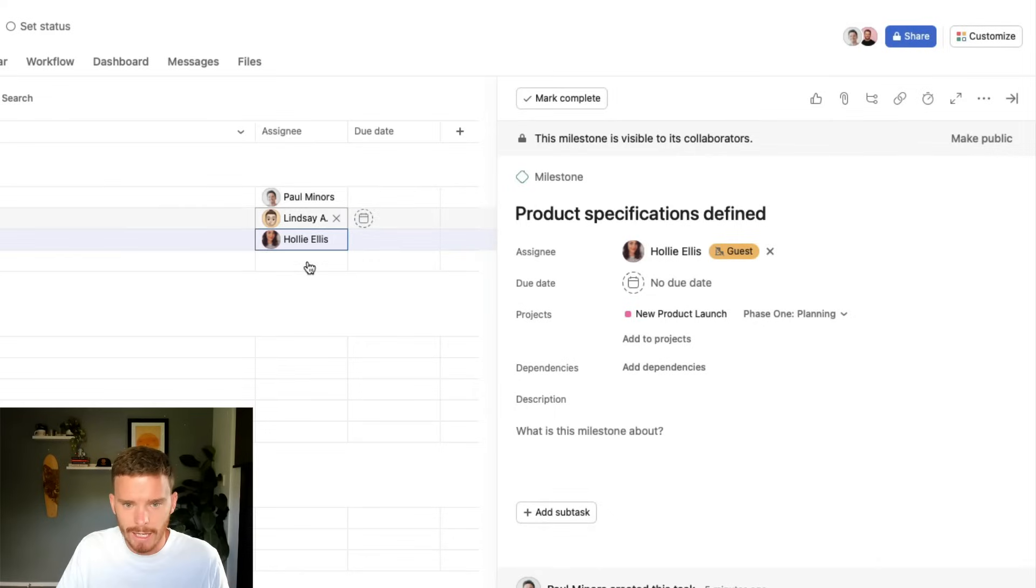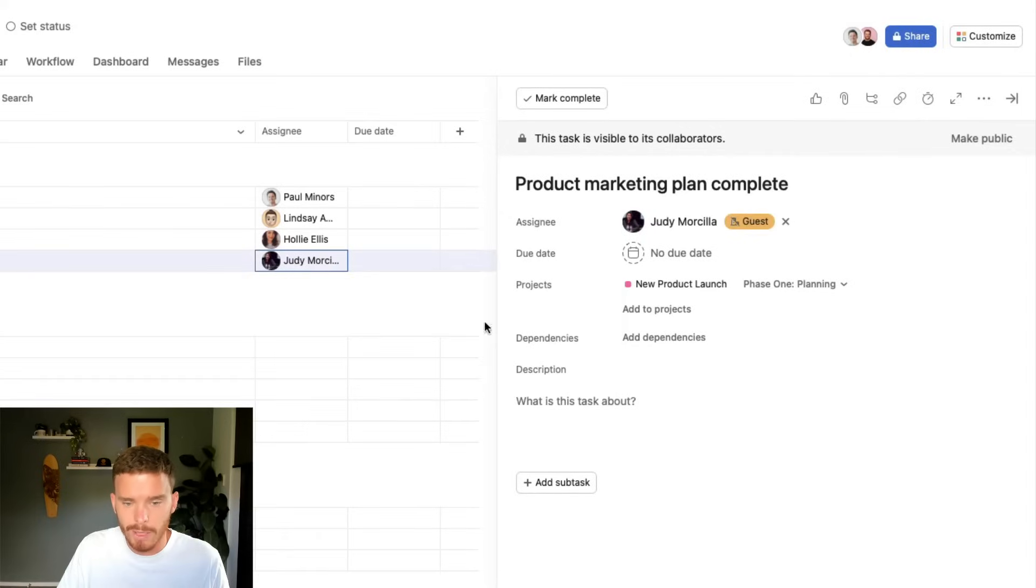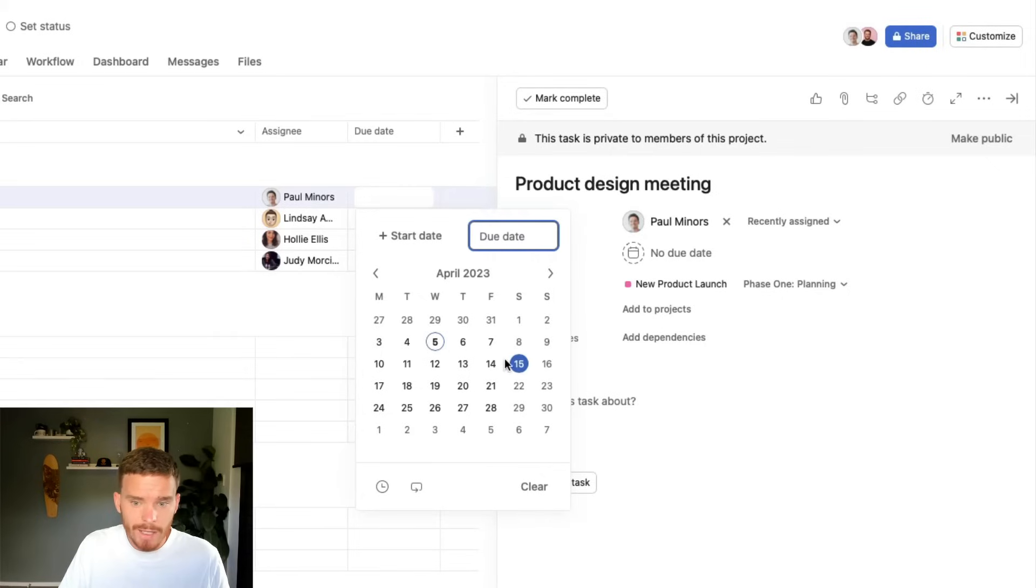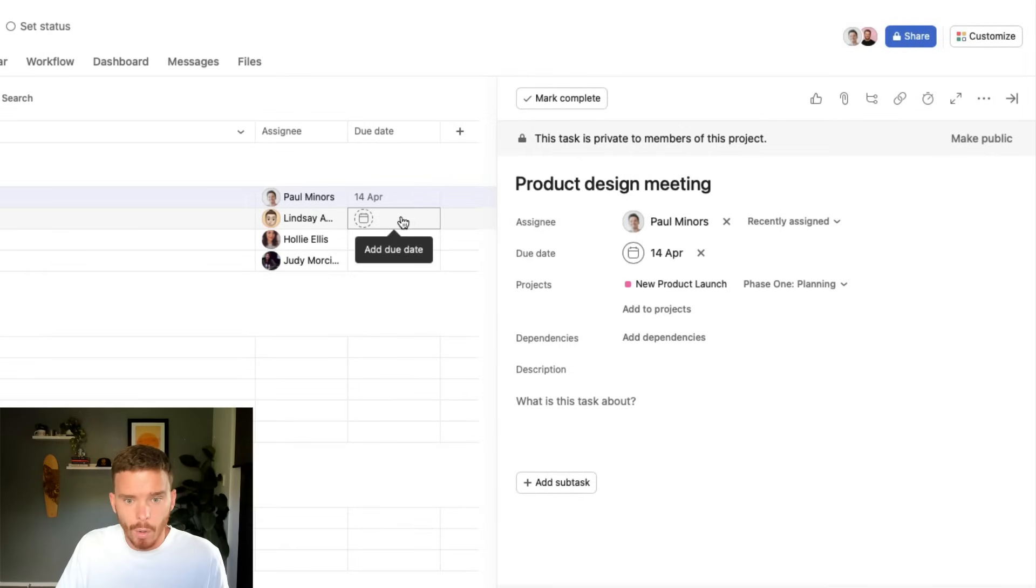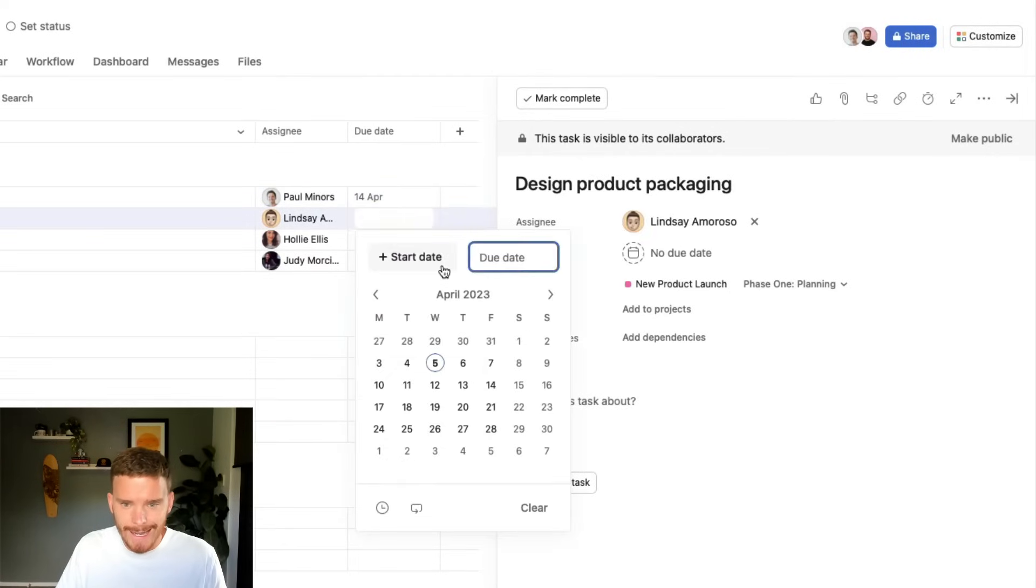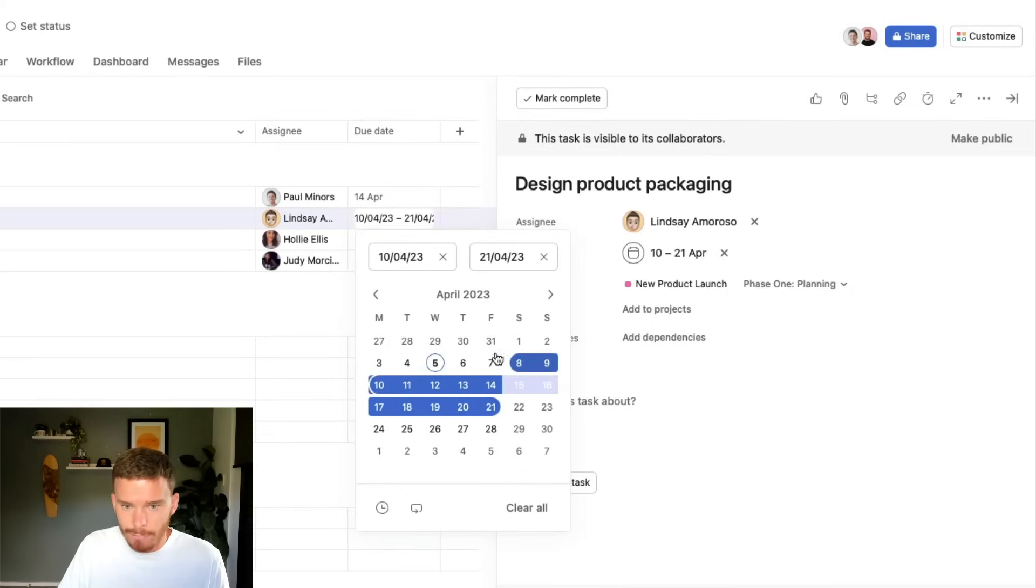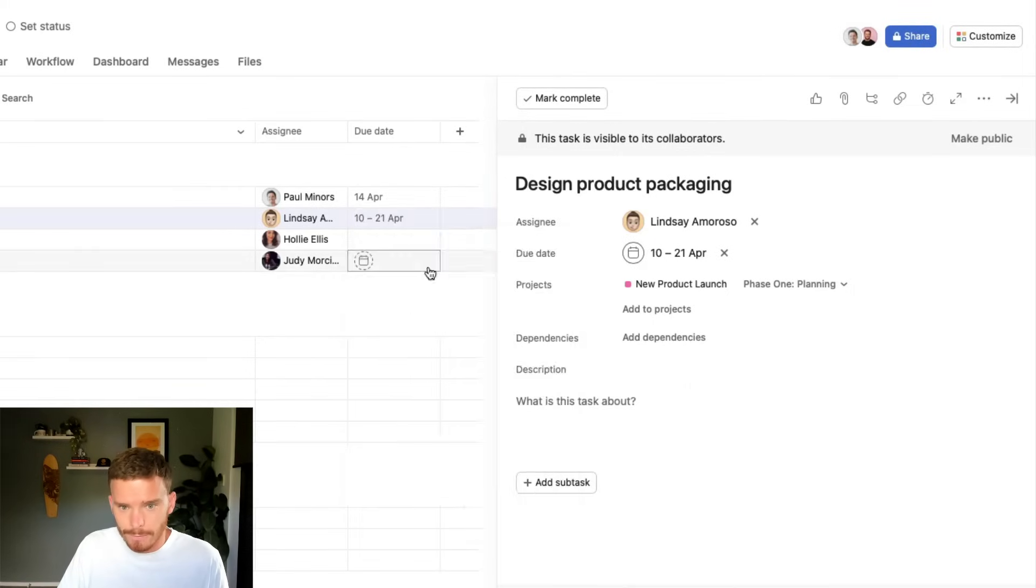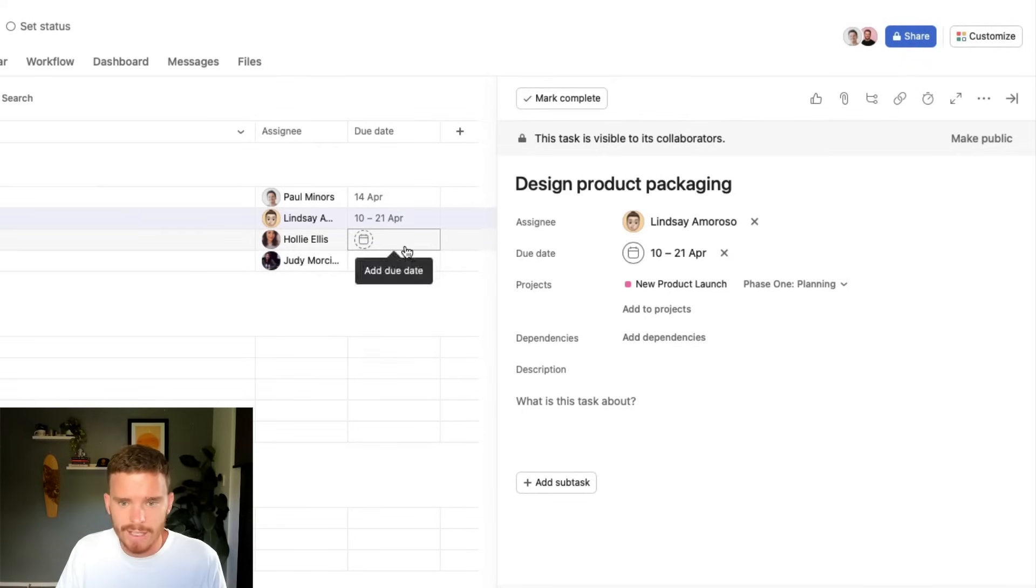I can either click here in the column or I can click in the task details here to assign this to various people on my team. I can also put due dates on my tasks. That could either be a singular due date if I just need the tasks to be completed before a specific day, or in this case here, design product packaging, this is something that might take a few days or a few weeks. So I could actually apply a date range to my task like this. And so now I've got a start and end date. And so I might continue going through my project now and setting up assignees and dates for everything.